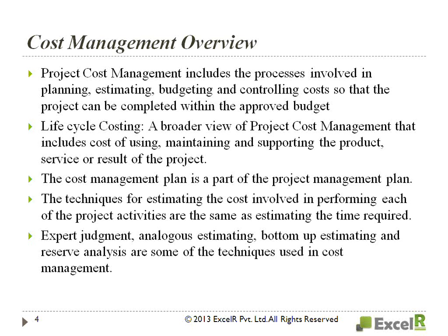So sometimes you do life cycle costing. Normally you do it when you are doing the project feasibility, in the initiation stage itself. You assess whether it's feasible or not, what the capital expenditure is, what the operational expenditure is. Sometimes you can do a detailed life cycle costing here. It's only a concept. In order to make you understand this concept better,